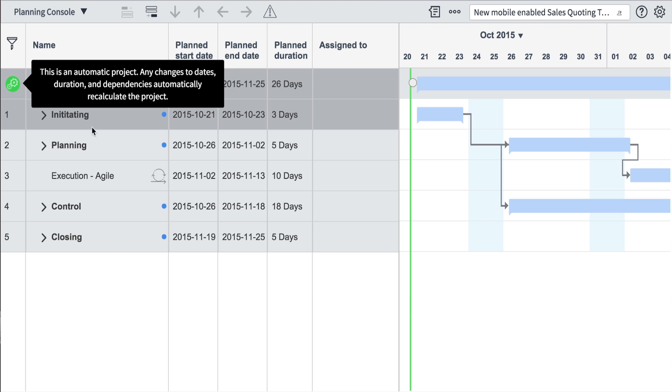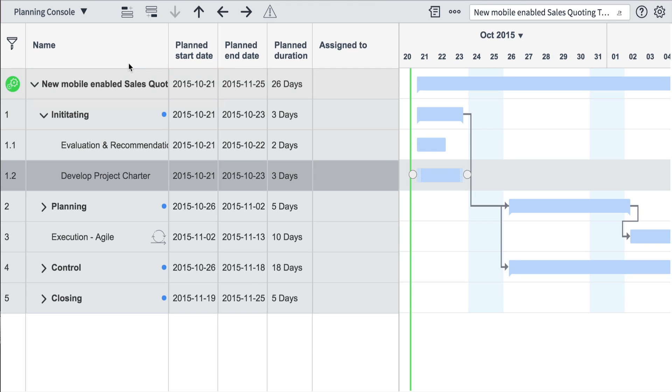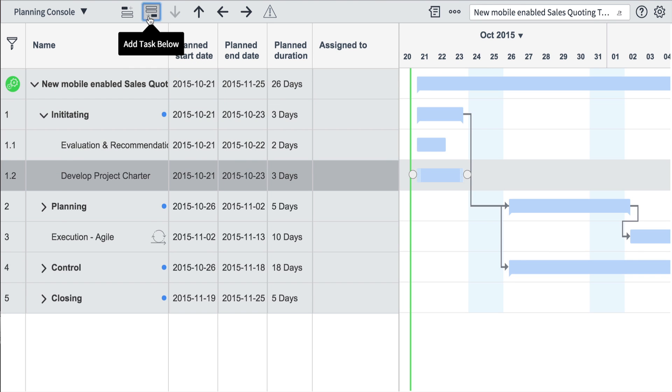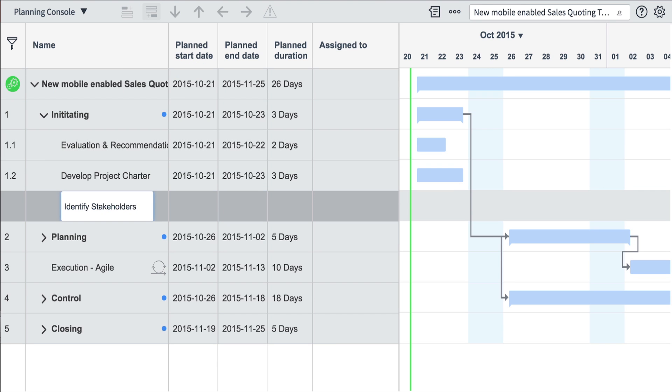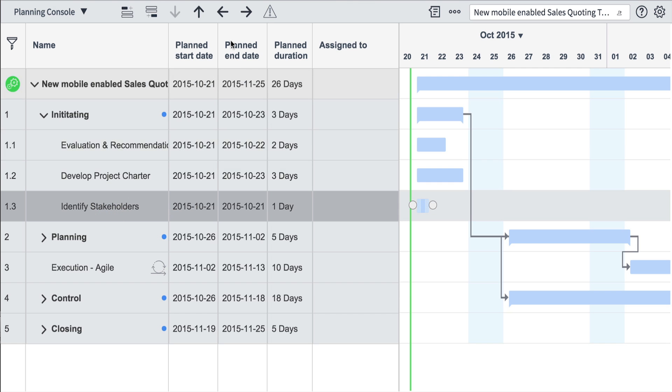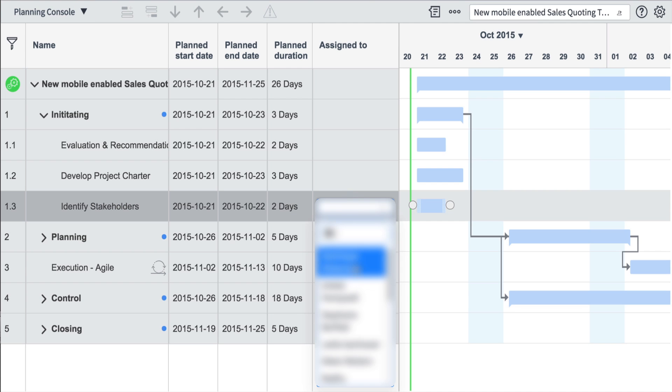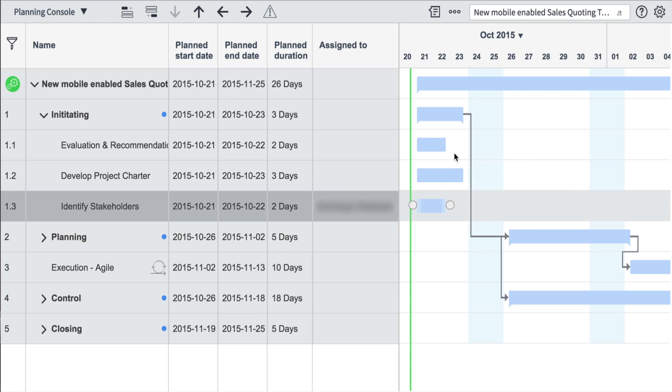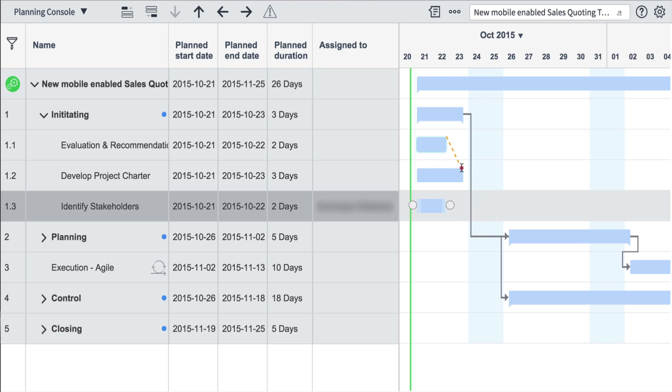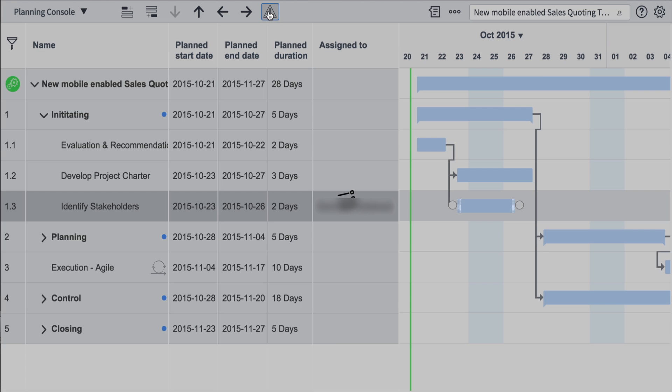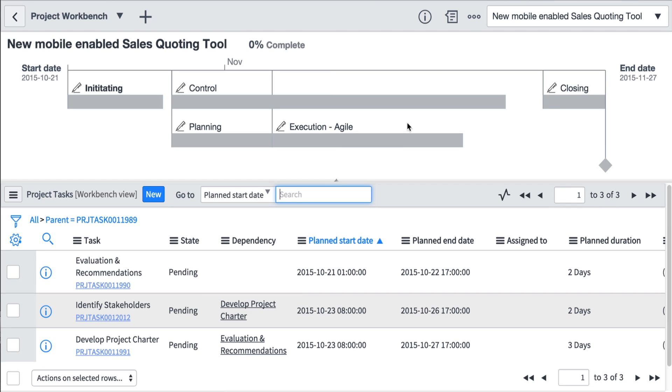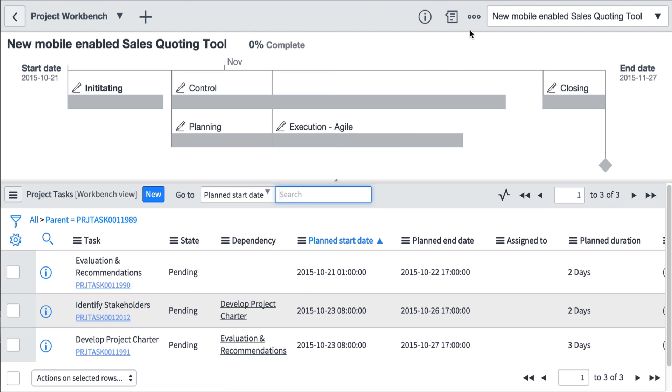PPS offers an interactive planning console to let project managers quickly create and manage their work breakdown structures, establish dependencies among project tasks, and track progress in a configurable timeline view. It also offers a powerful project workbench to manage and update project tasks as the project progresses.